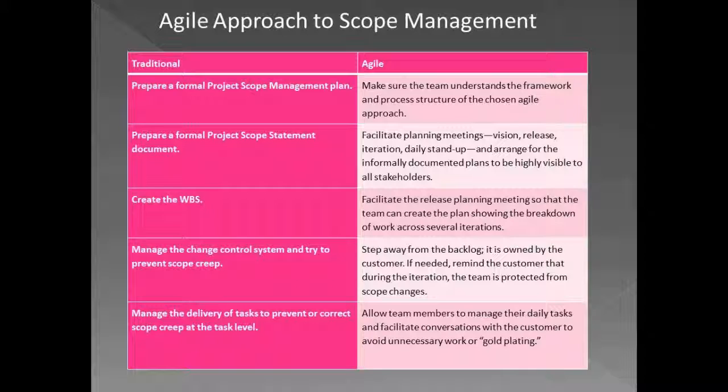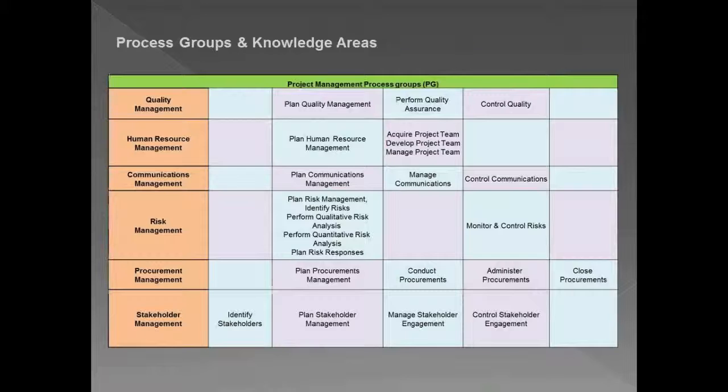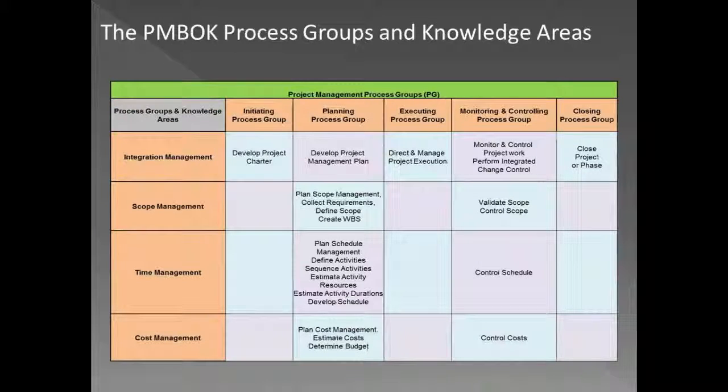And so that's the way we prevent scope creep, or I wouldn't call it scope creep, because Agile encourages changes and the scope keeps changing. But at least you control the scope within an iteration and take it to the product backlog. So this is about scope control. This was, as you see, the last process with regard to scope management, so validate and control scope.